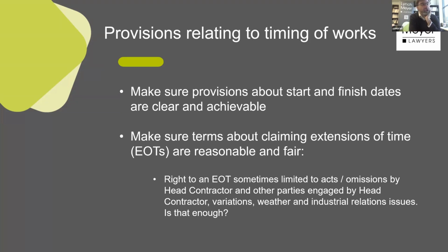there will be a finish date, and often when I'm contracting or reviewing a contract, there'll be a finish date. And one of the things I ask my client, I'll say, this is when they want your works to finish. Are you comfortable with that? And you should be more than comfortable. It shouldn't be a date that you think you might be able to reach if all things go well. It should be a date which has a little bit of float in it, as they say.